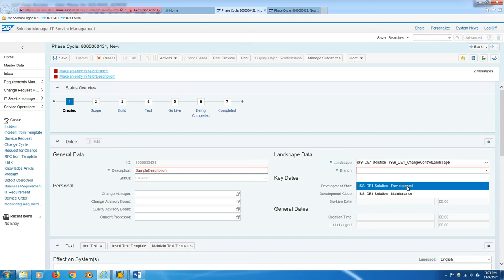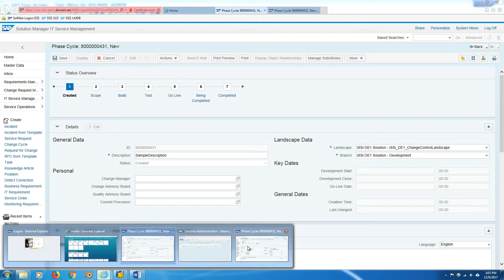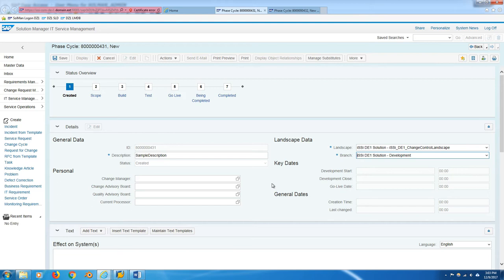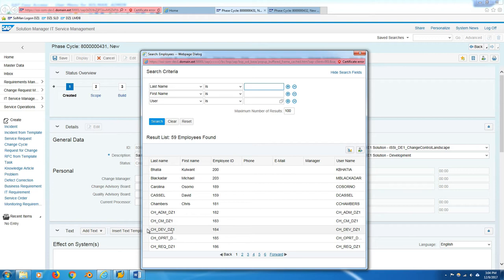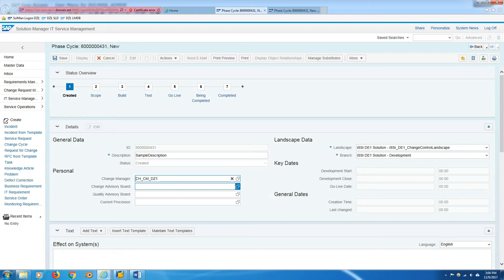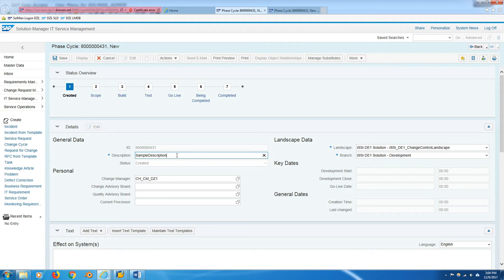So we're back inside charm and we're selecting our branch, which was, if I remember correctly, development. Yes, development, because there's nothing in the other systems. And you'd like to choose a change manager. This is the person who can actually release approval for change documents, the RFCs, request for change, in this phase cycle. So generally with template users, we're just going to use this guy here, the CM, CH-CM-DZ1. Let's save this. Sample description. You know what, let's name it video phase cycle one. Save.